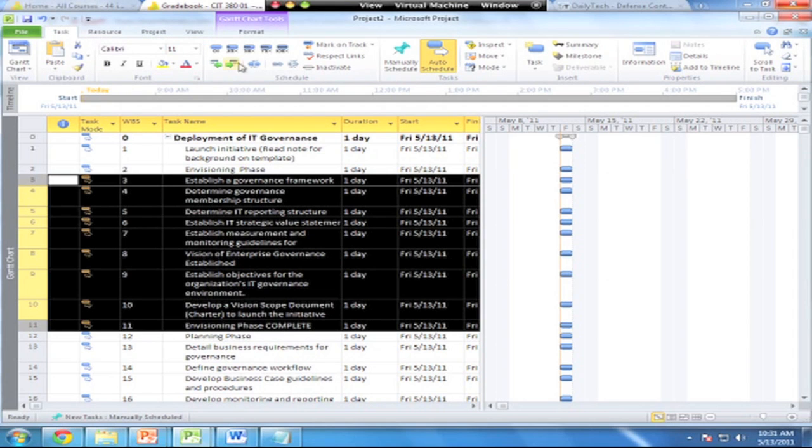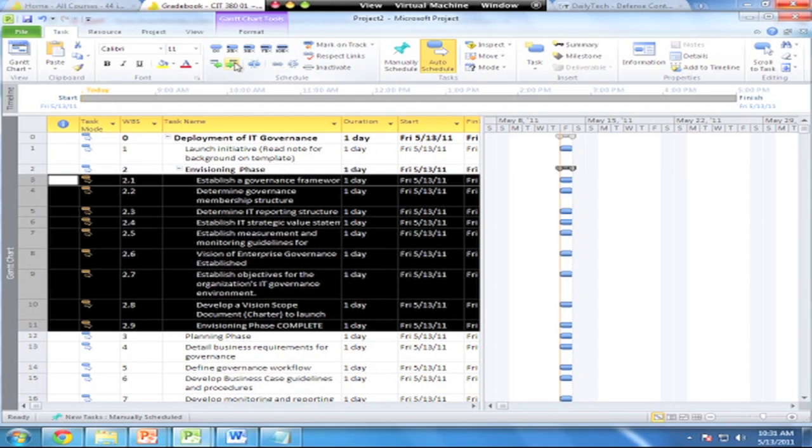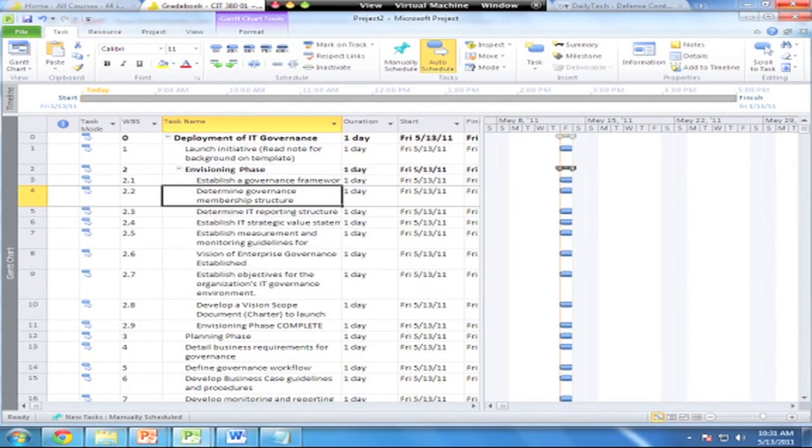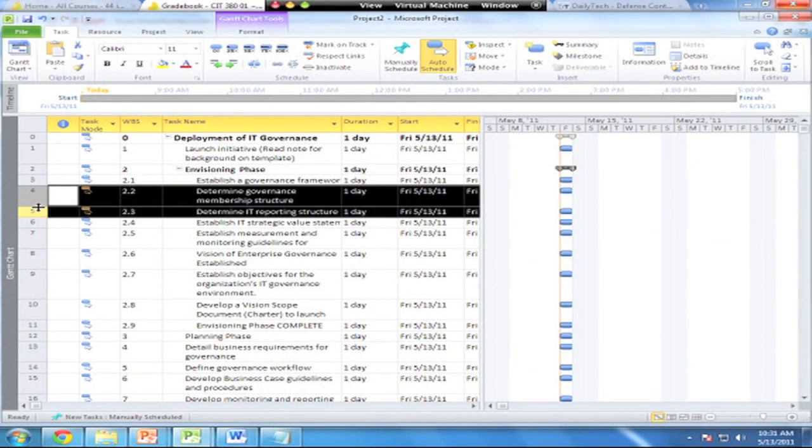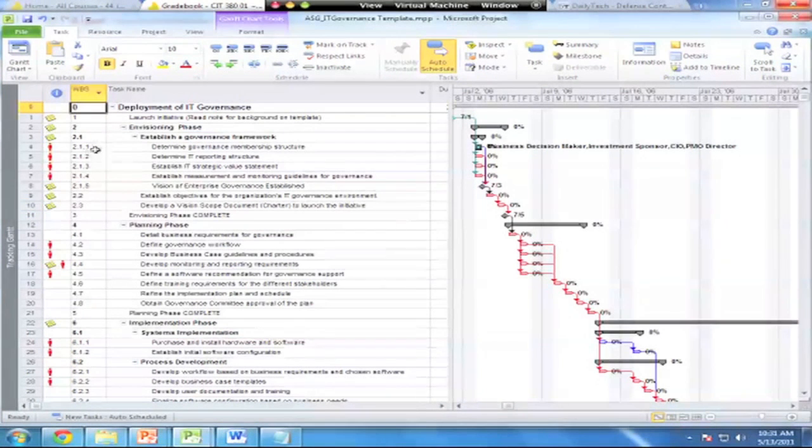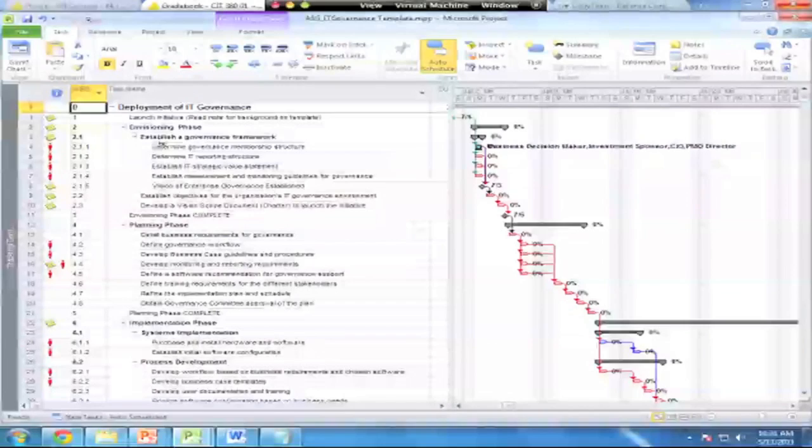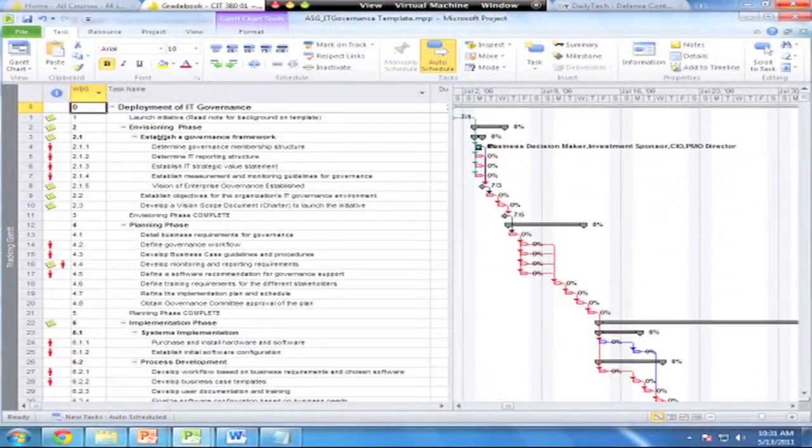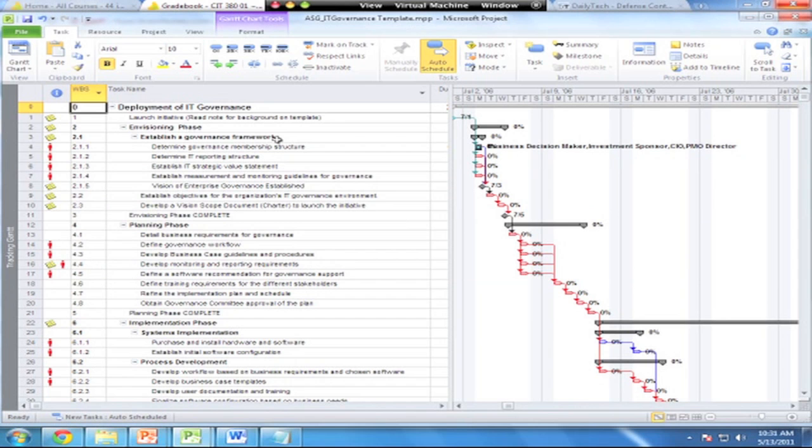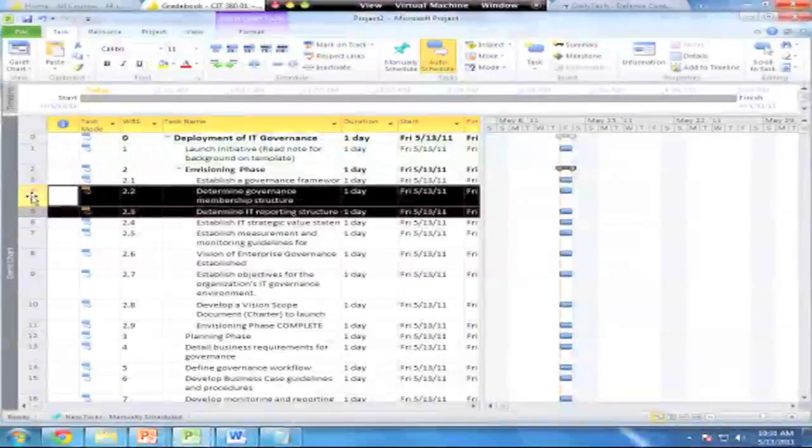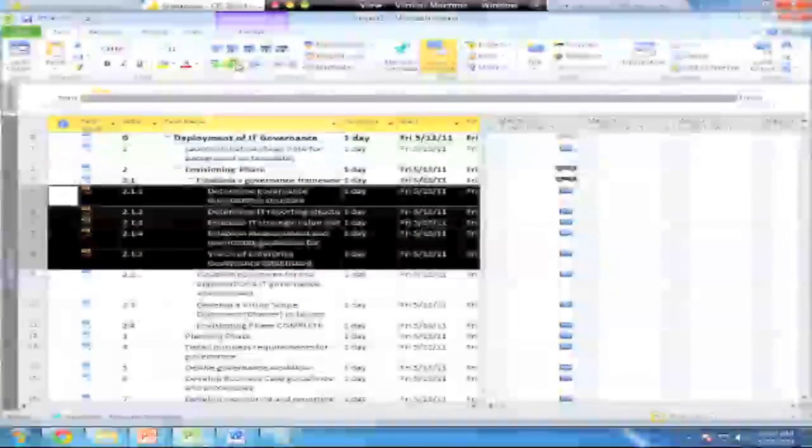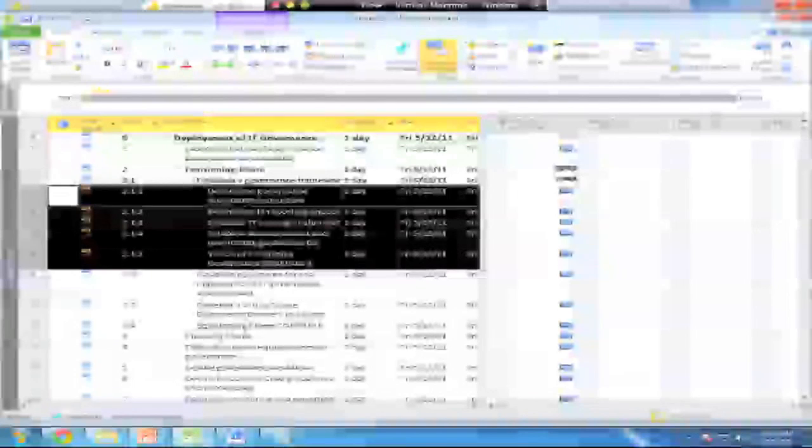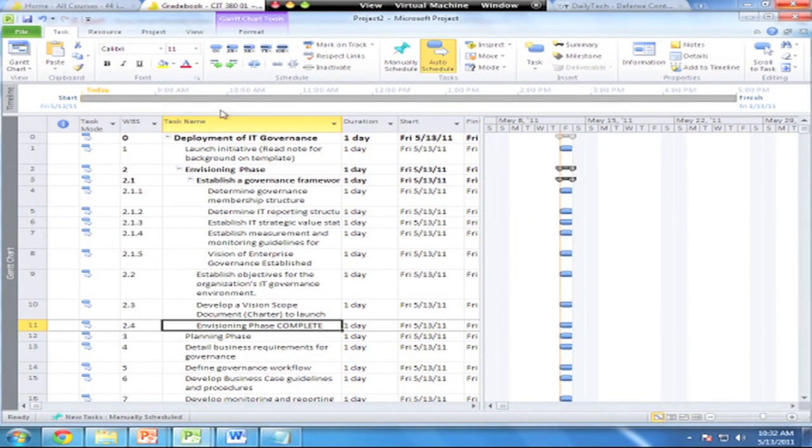I'll go back to the task tab and indent all of those tasks. Now some of these become sub-tasks under the first level. Let's go back and look at our model again real quick. We've got 2.1, 2.2, 2.3, 2.4, 2.5, so five other sub-tasks that fit underneath establish a governance framework. These are sub-tasks. Let's go back and match those up. From here down to one, two, three, four, five, those are all sub-tasks. I'm going to indent those, and then the envisioning phase complete, you can bring that back out.